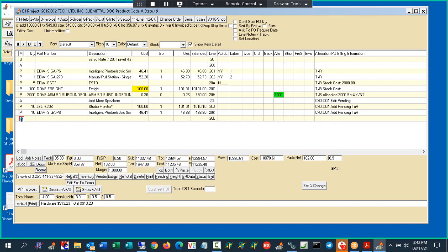And in your case, you're trying to deal with return stock and things like that. Well, that would be a return to stock negative quantity, return to the project negative quantity item, so you can add it on there, but you can't actually approve that change until the mechanical part of it, the parts physically come in and we're going to credit it back to the job. Then you approve that change order, then it reduces the stock cost of the project. Did that make sense what I just said?